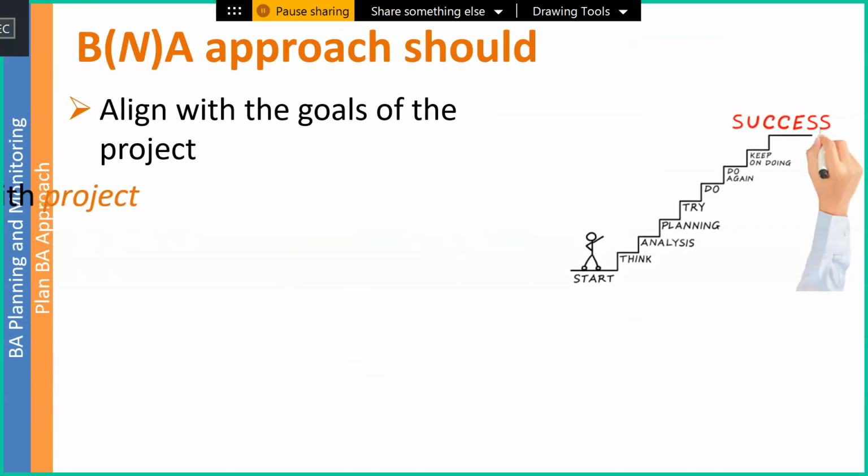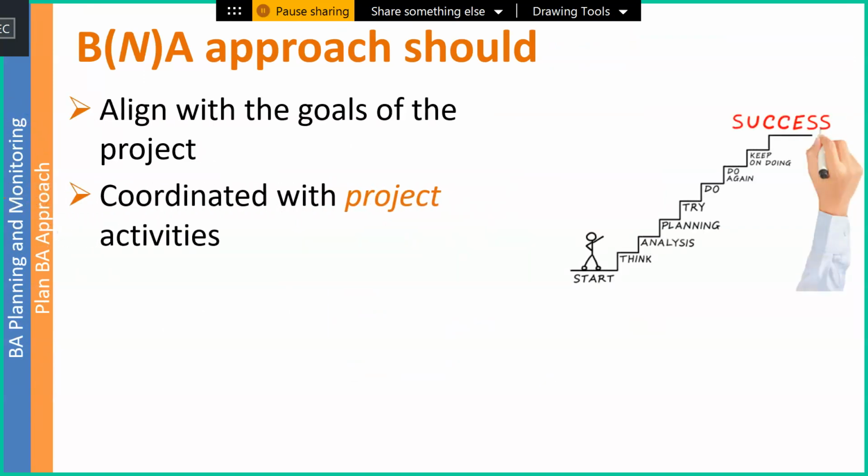So when I'm thinking about my business analysis approach, ideally it is structured and selected based on the change we're working with, right? What are the goals of this change? And if this change is about protecting us from some risk, and it's a regulated risk, I should be doing a more waterfall approach, right? I should be thinking it out, planning it out carefully. It's regulated. It could hurt us if we get it wrong.